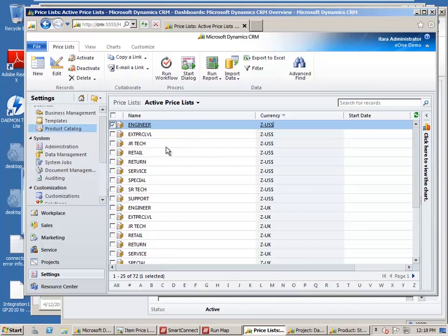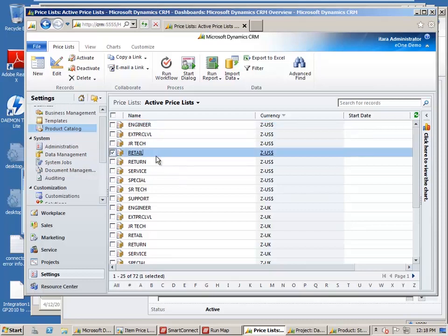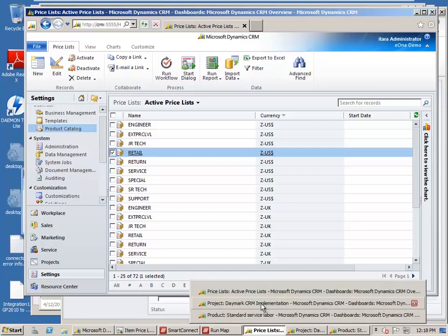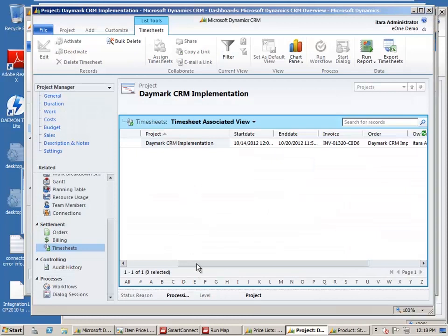Another question, what happens when you have multiple consultants working on one project and you want to combine all their hours into one invoice? How does that work? That's a standard scenario of CRM-Project, so you can have multiple consultants with the same rate or with different rates there. CRM-Project looks at which services are to be billed, and it takes the right product then. And you can choose if you want to have a standard service for each consultant that they provide, or even a specific service that they provide in this project, or they can write into each activity that they put into the system which service they just provided.